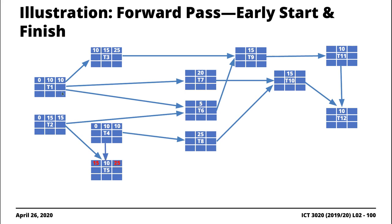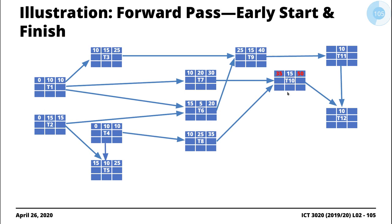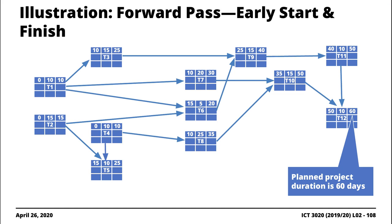T6 depends on T1 and T2; maximum of 10 and 15 is 15. T7 has one predecessor T1, so we pull 10. T8 depends on T4, so we pull 10. T9 depends on T3 and T6; maximum is 25. T10 depends on T7 and T8; maximum is 35. T11 depends on T9, so we pull 40. T12 depends on T10 and T11; maximum is 50; 50 plus 10 gives 60. This 60 is our planned project duration.